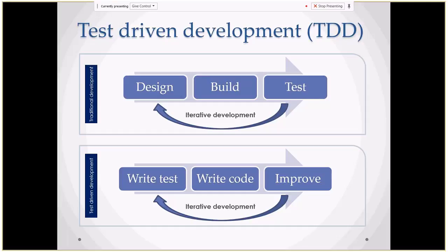As Dilanka correctly said, from traditional development, we have moved now to using test-driven development with Scrum. If you take the traditional development, in early days, what we did was we came up with designs, then the developers worked on these designs and requirements, then they built the site, and then only the testing started. When the testing phase comes, we used to find lots of defects from the requirement itself, as well as from the functionality or UI perspective.